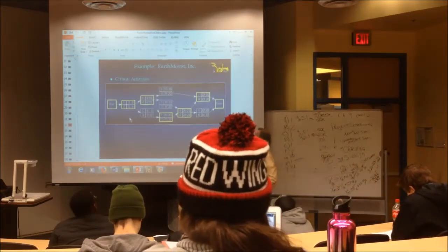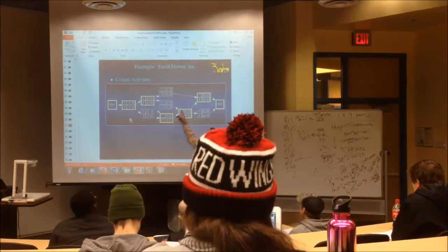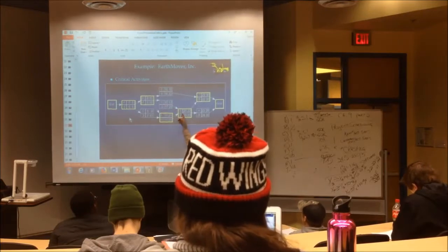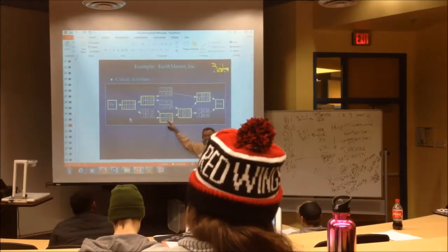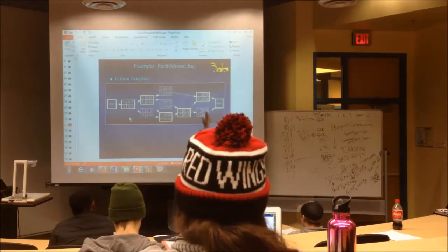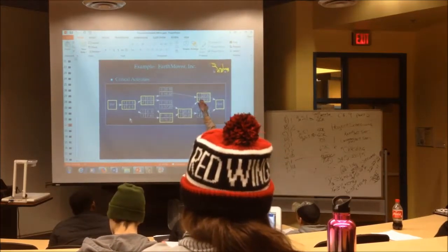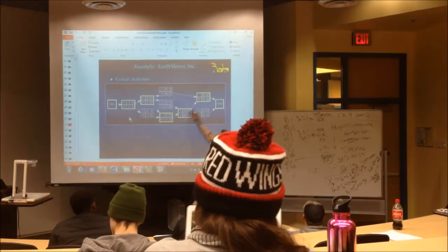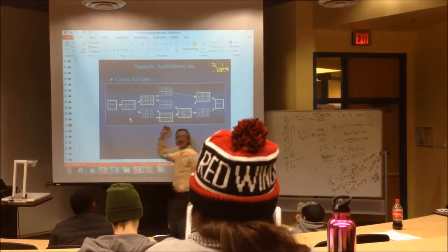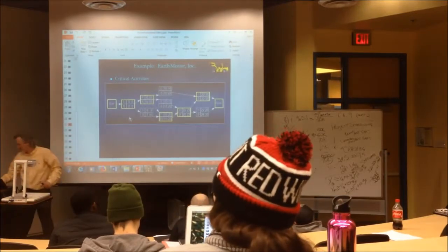So, G. You would do G with an X sub E preceding it, and then you would do it again with the X sub F preceding it. All right? Let me find another. I. You do X sub I with the X sub D preceding it, then you do X sub I again with the X sub G preceding it. So now look at these.